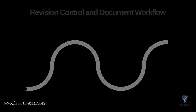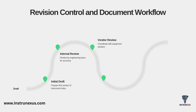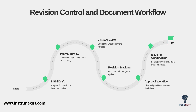Because so many disciplines depend on it, the instrument index must have a rigid revision control and document workflow. It follows a clear path: you start by preparing the initial draft of the index, which then goes for internal review where your engineering team checks it for accuracy. A crucial step is vendor review, where you coordinate with equipment vendors to confirm their data. Throughout this entire process, you must use revision tracking to document every single change. It then goes through a formal approval workflow to get sign-off from all relevant disciplines — only after all these steps is it finalized and given the Issued for Construction status.